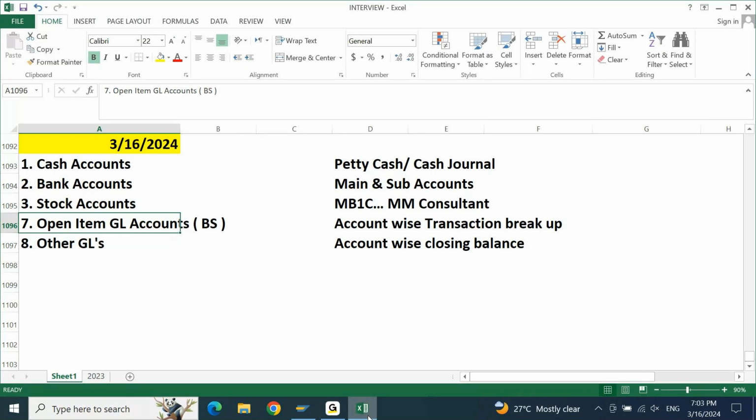The moment you upload the data, the debit credit entry automatically gets recorded with the help of BDC. Once your BDC entries are posted, your client can see them and will confirm that all the entries related to the current month are posted. Now, for uploading the cutover data, the deadline is before go live. Before you go live with the project, you need to make sure the cutover data is uploaded. That is the first point.